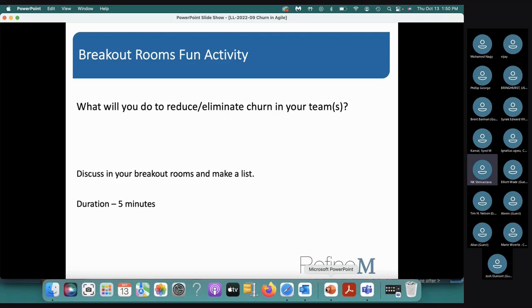Right. Absolutely. And there is a way to push back. You can say, okay, you need this, we'll handle it in the next sprint, and you will get it at the end of the next sprint. And they may say it is urgent. So may I know what is the reason for the urgency, or is it so urgent that we have to leave our planned work and take this one?